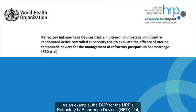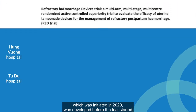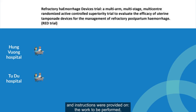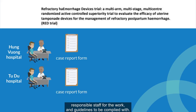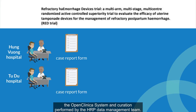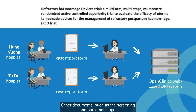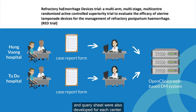As an example, the DMP for the HRP's Refractory Hemorrhage Devices REDD trial, which was initiated in 2020, was developed before the trial started. Instructions were provided on the work to be performed, responsible staff for the work, and guidelines to be complied with. Data roles and tools were defined for each participating center. Data collection was conducted using the OpenClinica system and curation performed by the HRP data management team. Other documents, such as the screening and enrollment logs, participant form register, serious adverse event tracking log, and query sheet, were also developed for each center.